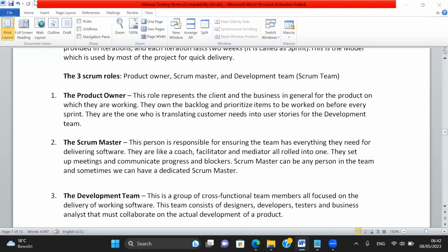When 2 or more persons are working, how will you track who is working on what? Sometimes the same functionality can be worked on by multiple people. We should avoid duplicate work, right? In that case, we have to know who is working on what. So they will divide each functionality into small parts and assign them to the corresponding developer. The assigning is done by creating user stories. I will explain Jira in detail, then you will understand more. As of now, just understand that the business analyst will create user stories.